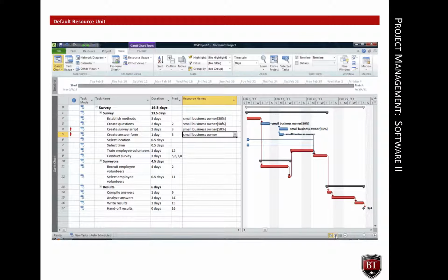The schedule that exists before resources are added is created based on task dependencies and the duration of the tasks. When you schedule resources to perform the tasks, the schedule doesn't immediately account for the availability of task resources.